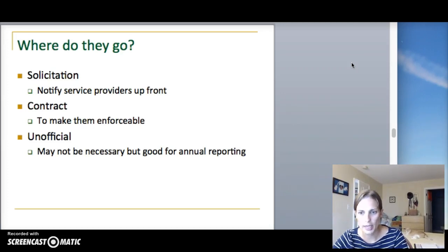So we haven't gotten to contract writing yet in the class, but we did discuss negotiation, and often tracking the performance of your vendor will come up extensively while negotiating a contract. Typically, the performance measurements would go in the scope of work, if they pertain to the actual work the vendor is going to be doing. We'll discuss this a lot more next week when we talk about actual contract sections and portions, but it's really important that the scope of work you've written for the RFP becomes part of the actual contract, so the performance measurements that you write for the RFP will also become part of the contract. If possible, it's ideal to set and communicate performance measurements really early so that the vendors know what they'll be expected to achieve, but eventually it's most important that they get into the contract.